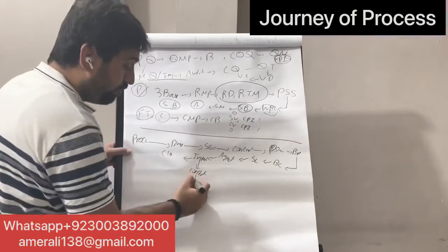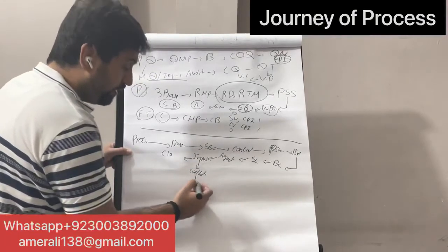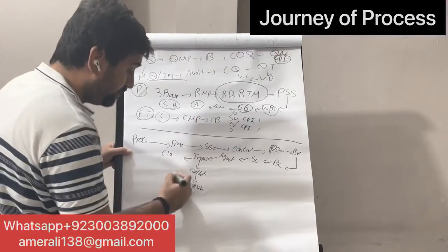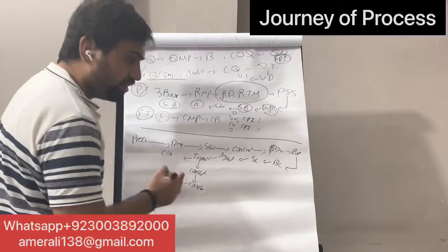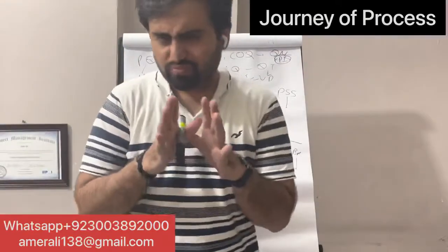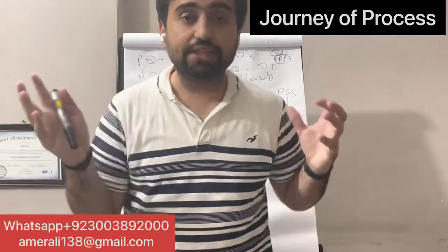We try to do collaboration. If we are able to do collaboration, good. Close the procurement. If not, then we have alternate dispute resolution. We get a third party, and if we don't get a resolution, we go to the court. So this is basically the entire process in summary form.